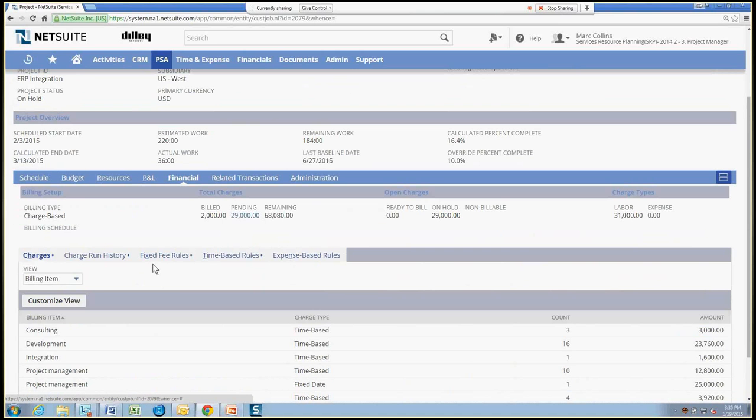Financially, this project has been set up as a charge-based billing project, so we know that we'll have charges involving time that needs to be billed to the customer, as well as expenses that need to be billed to the customer.